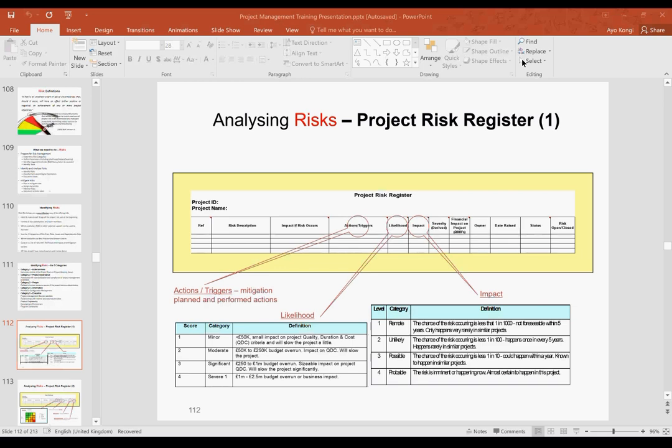So we have a risk description here to say the risk description is there is a risk that the mayor of London Borough of Bexley laptop might not be available for us to install the Office 365. What is the impact if it should occur? There will be a delay in the project timeline. We can quantify it, say by 2 days or by 3 days, if we are able to analyze what the impact is. Okay.